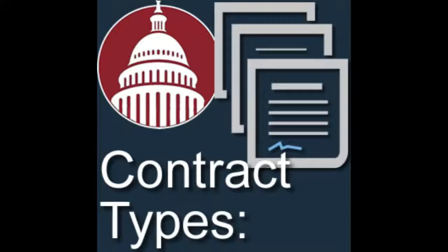And to give an example of a pure cost type contract line item, I've done it for travel. So we have a product contract where they're developing some equipment, and they're going to be traveling. Well, it's easier to say, we know how many trips you're going to take, but airfare is very volatile. I mean, if you're flying to Florida in December, it's going to be more expensive than flying to Florida at another time. Yeah, one of the hardest things to price. The most volatile thing there is.